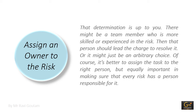After prioritizing, you need to assign an owner to the risk. All your hard work identifying and evaluating risk is for nothing if you don't assign someone to oversee each risk. Ideally, this is done when listing the risk. The risk owner is responsible for identifying the risk when and if it should occur, and then leading the work towards resolving it. If you don't give each risk a person tasked with watching out for it and resolving it when it arises, you are opening yourself up to more risk. Identifying risk without managing it does not protect the project.